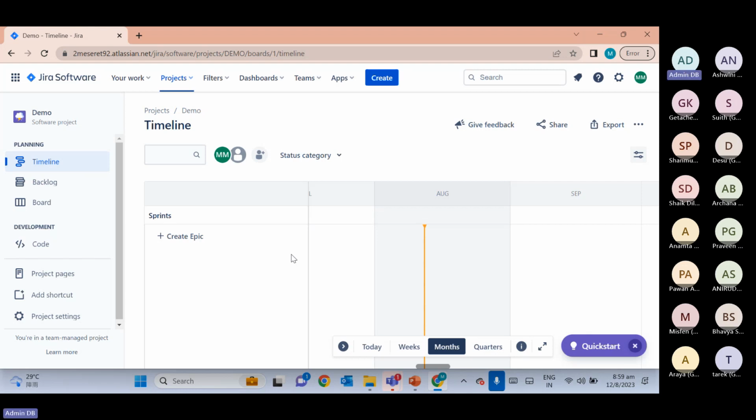Okay. And then whenever the Scrum Master creates the tasks, based on the story points, let's say one developer can deliver 7 story points in one sprint. So they will assign 1 or 2 or 3 tasks having a total of 7 story points. Okay. So whenever we define the capacity of any person, there will be multiple factors, like number of years of experience, and then for how many days he has been working in that project.